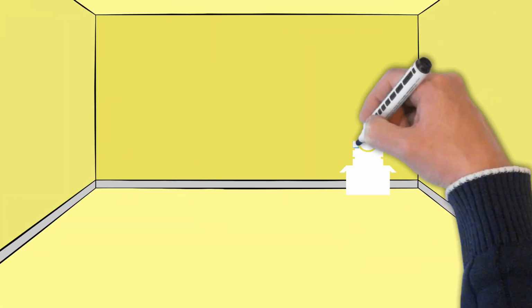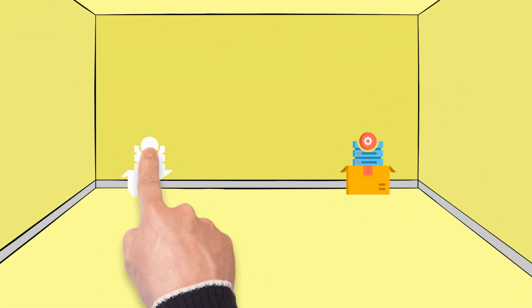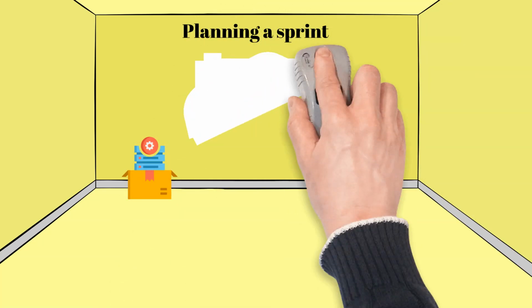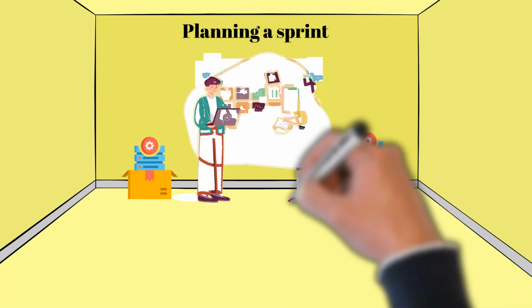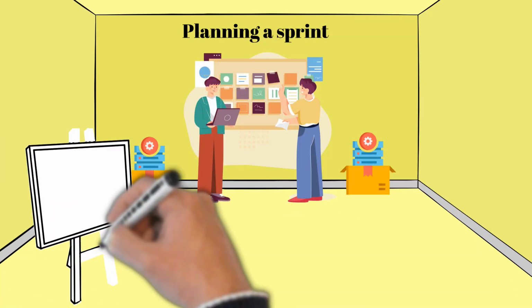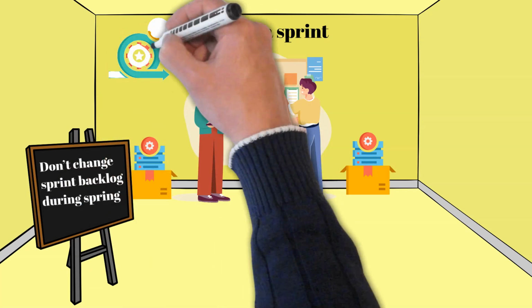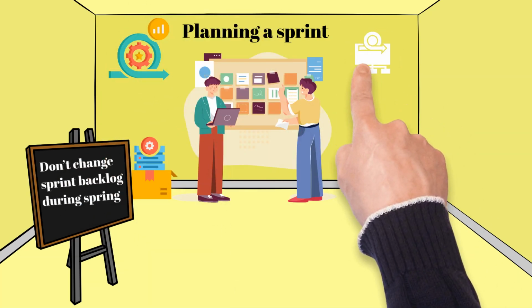Once you start planning your sprint, you would start by selecting stories that go to the sprint backlog. After stories are selected, you should not change the backlog anymore. Running a sprint is the only time not to be agile in the Agile project management framework. There are competing frameworks with Agile, and some of them allow constant backlog changes.